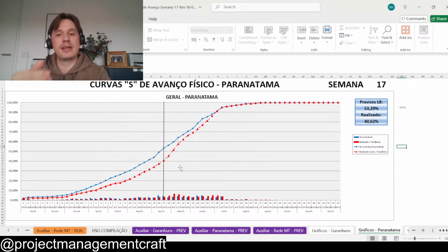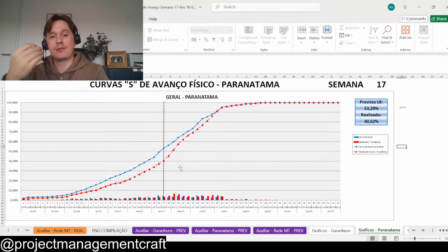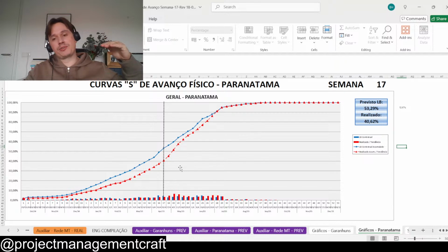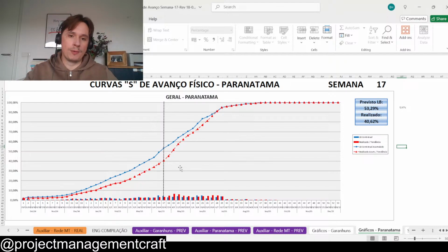What happened in reality? Mainly, if you are handling construction, this peak is not executable in the real world. Saying that the construction comes at 0, 0, 0 delayed or 1, 2, 1, 2, 1, 2, and at one peak you have 1 week in which you have to complete 40% of the construction. That's not going to be doable.